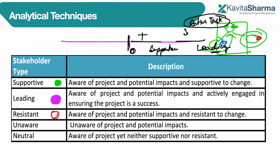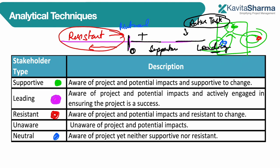Then there are resistant stakeholders. Resistant means their attitude is negative — zero is neutral. Resistant stakeholders have an attitude that they want your project to not be successful at all. They will say wrong things, mislead people, and create fallacies. These people need to be handled — their communication should be reduced, or they should be converted to at least a neutral position. These are the people we have to manage.